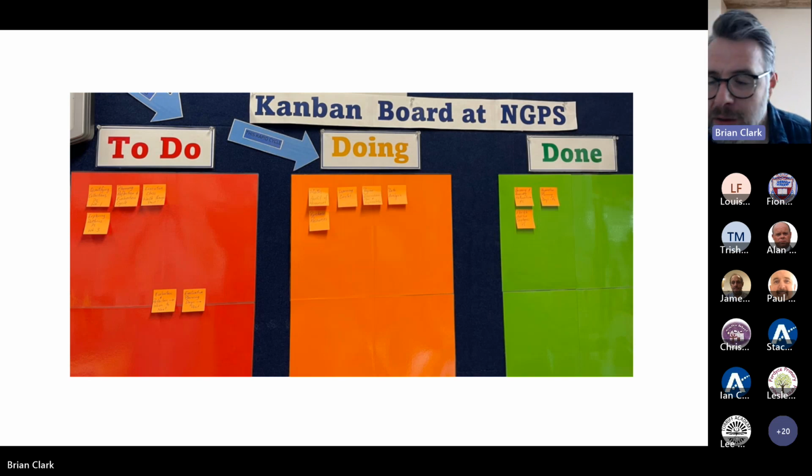You might have things that are in the doing column, but you realise, because you're meeting and talking frequently, it needs to go back to the to-do column, and something else takes its priority. But the more you've managed to move your individual chunks to the right-hand side, the easier it is to celebrate success and be vocal about how much we've achieved in that period of time.